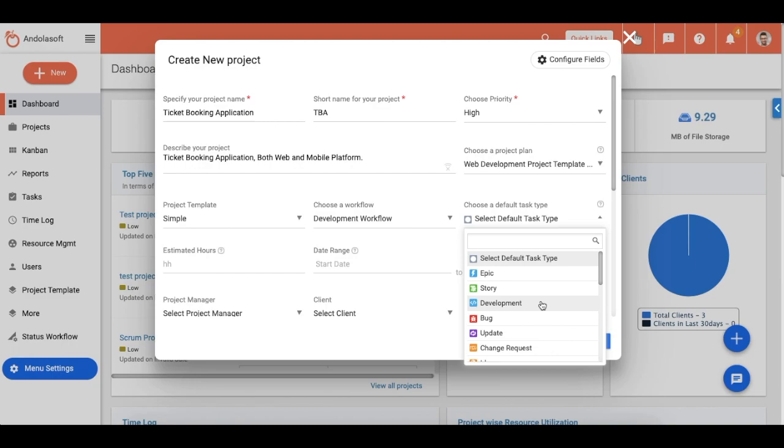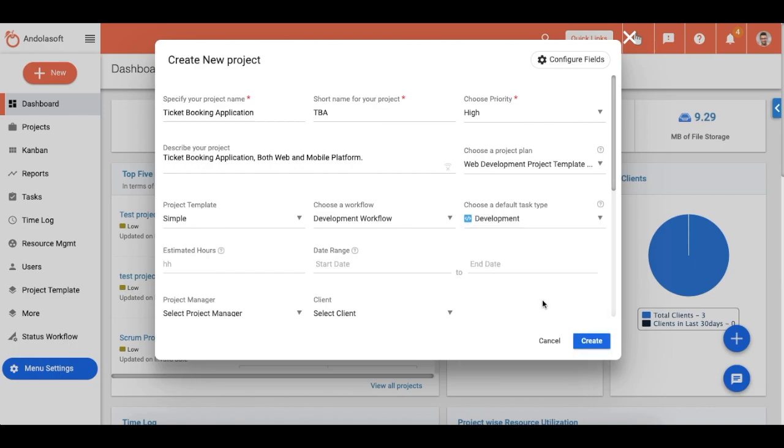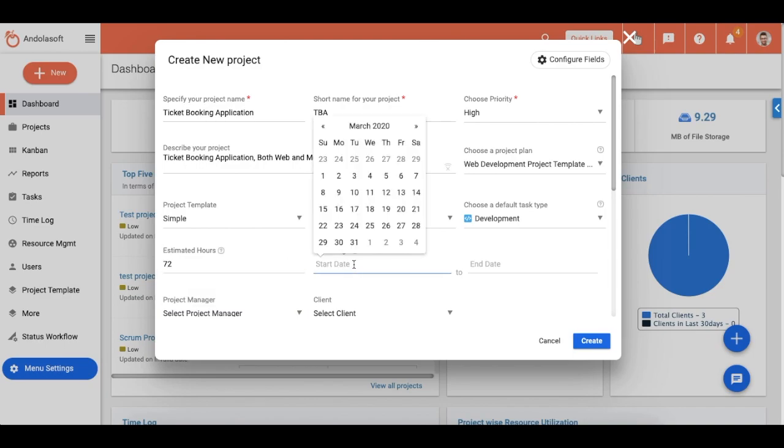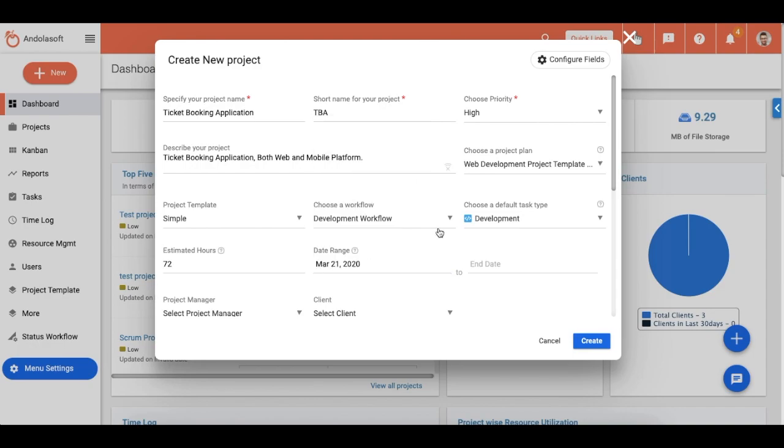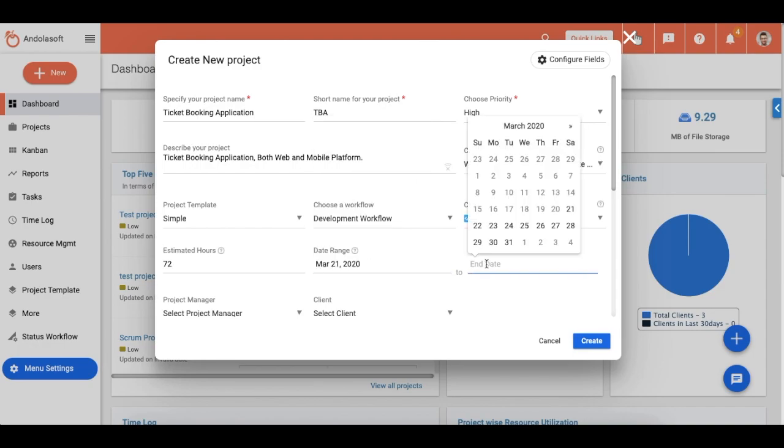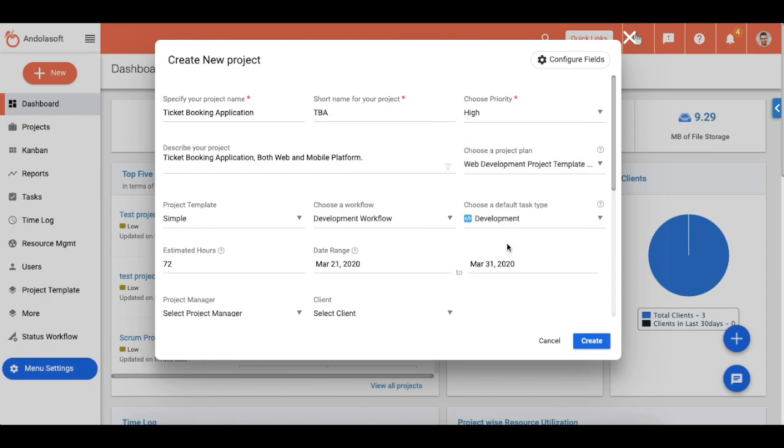Select the default task type. Task types are a custom task attribute that allow you to categorize tasks in a meaningful manner. There are a few default task types available in OrangeScrum with the freedom for you to define your own task types for individual projects as well. Now put the estimated hours to complete this project. By default, we count 8 hours as one working day, and if you add 16 hours it will be counted as two days.